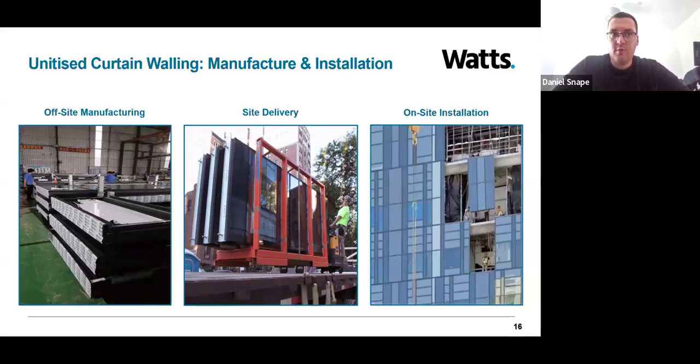This form of construction really benefits sites with small storage areas, as whilst panels are large, they can be delivered in batches, often from a temporary storage yard located somewhere between the factory and the site, and then installed prior to the next delivery. So it enables a phased delivery and installation approach rather than having to store a bulk of materials for the installation process.